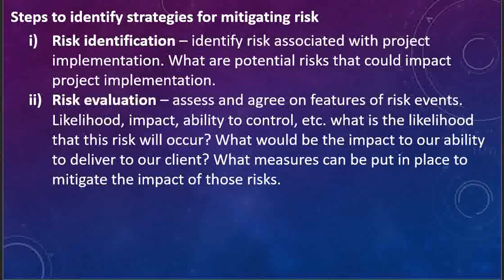Risk evaluation. Assess and agree on the features of the risk event, the likelihood that this risk will happen, the impact, and the ability to control. Can we control it 100%? Can we control it partially? Is it completely out of control? What is the likelihood that the risk will occur? And then what impact will it bring in delivering and implementing our project? What measures can we put in place to mitigate the impact of those risks? So that is risk evaluation.